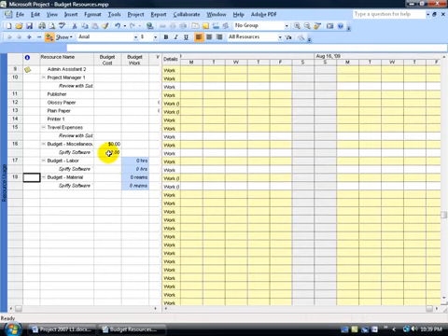Let's say the budget that I've set aside for all my travel expenses or my cost is $2,000. Go ahead and type it in and hit enter. When you type it in next to the task that the resource is assigned to, it'll summarize it up above for the resource. So the total budget we've got is $2,000 set aside for the whole project because, again, that's the project summary task.